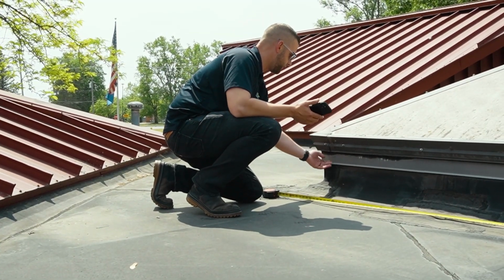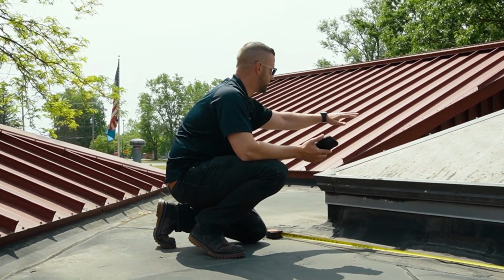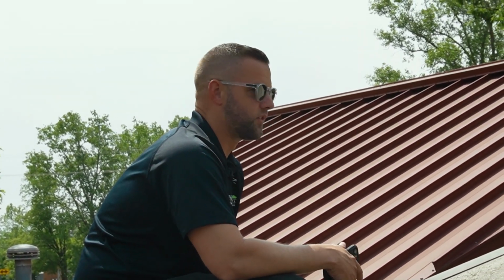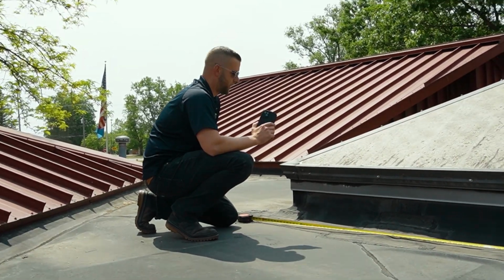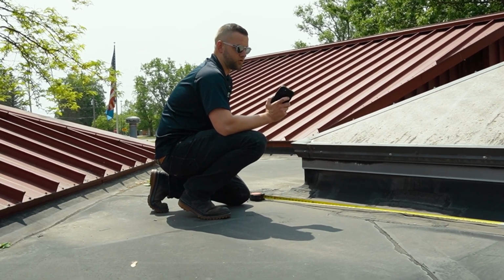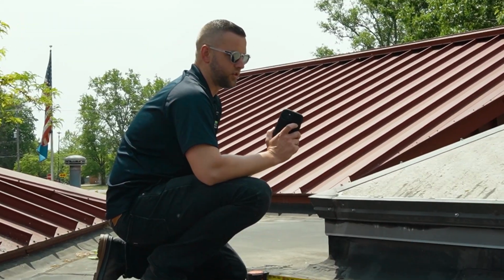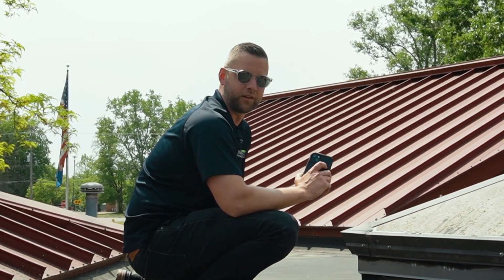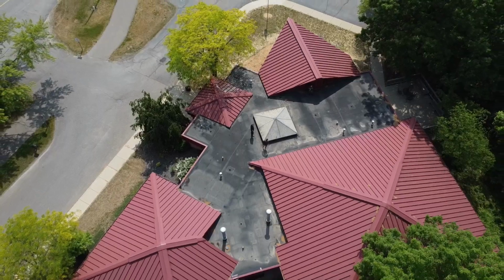We're gonna take this entire thing off, roof it, and put a temporary roof over it with membrane until the new one shows up. But I wanna make sure that the dimensions are right, because again, it's a $20,000 unit. When you buy it, you own it. This is my second time out here. If I didn't bother to measure this a second time, the unit alone is just north of $20,000 and 12 to 15 weeks to get in. So essentially I'd be at 30 weeks if I had to do it again, plus another $20,000.